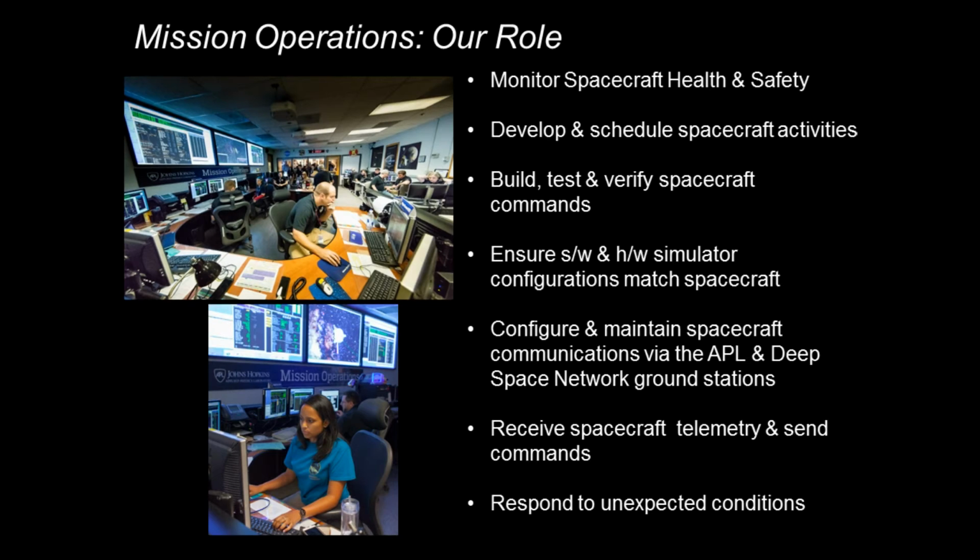Contingency plans, we needed to think about those things. We needed to think outside of the box. What could happen? Go through those paper exercises, and for those contingencies that we thought were high risk and might take a lot of time to develop, we actually developed procedures in the event we experienced them.